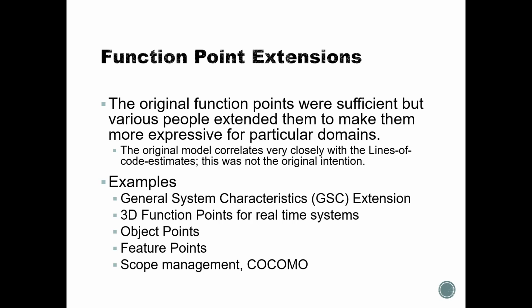And I know for a fact that, for example, the scope management at Kokomo, Kokomo 2 actually, is something that's still taught and used in the industry. Not during the development work, but for example, when we are assessing how much something might cost us to develop, so that we can participate on a request for projects or something like that. We know how much it might actually cost, so we have an idea how much money we want from the customers to develop this feature.